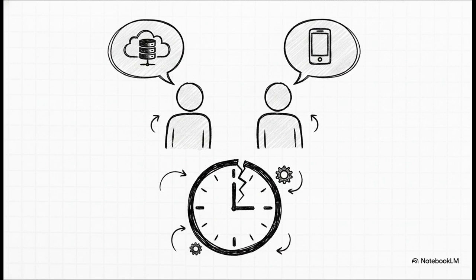Imagine a situation where the software is completely coded, it's ready to go, but the physical hardware required to actually run it is still months away from delivery. People often falsely assume that if the software works, the overall system is a success. But that completely masks the massive dependency between physical infrastructure, human processes, and the code itself.